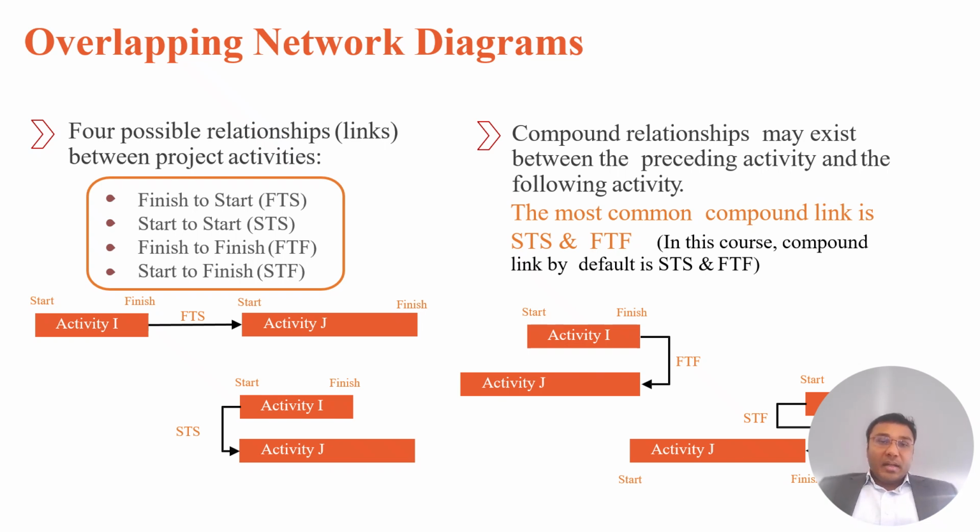So only when the night security contractor signs off, the day contractor arrives and signs in. That's the concept that we can think of. This predecessor activity cannot start until the successor activity of night shift security signs off. So this is one example. Why do we use start to finish? To have continuous security. We need to have 24-hour security. So the night crew cannot finish until the day crew starts. That's the easiest example we can think of.